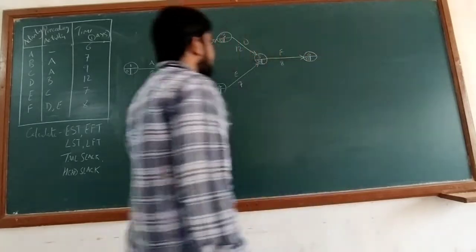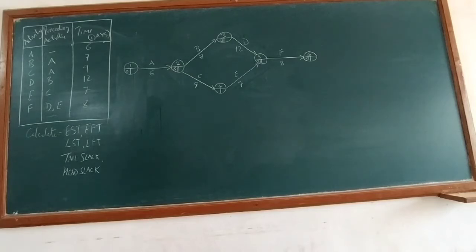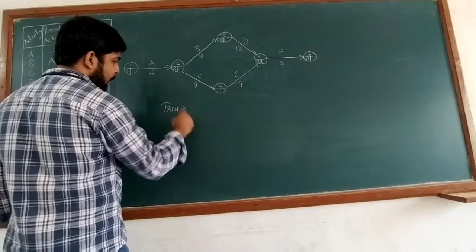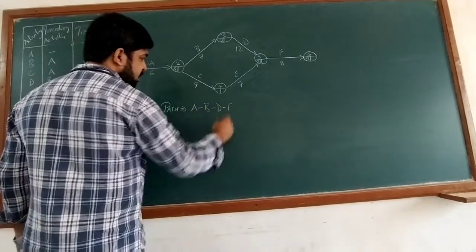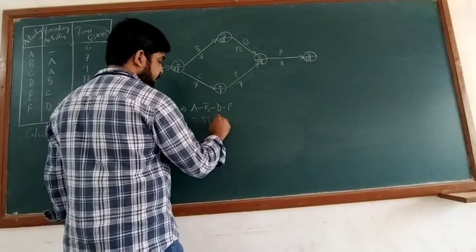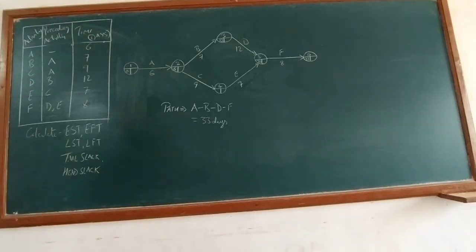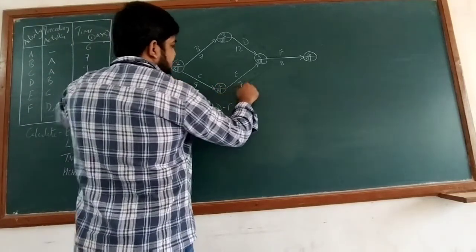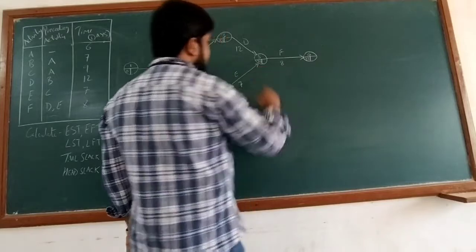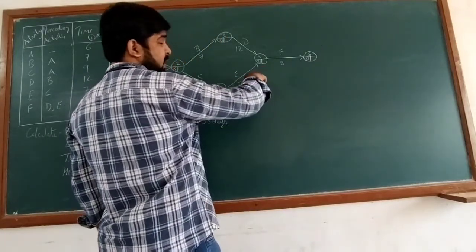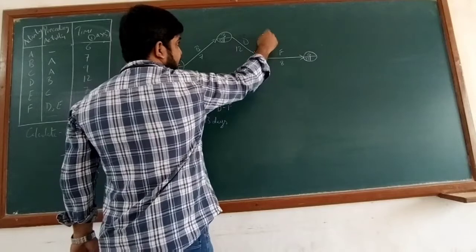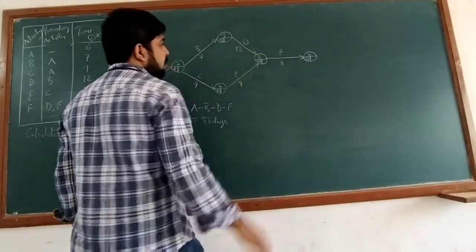So along path A-B-D-F we require 33 days. For the next path: 0 plus 6 gives 6, and 6 plus 9 gives 15 at node 4. Then 15 plus 7 gives 22. However, at node 5 we have both 25 (from path A-B-D) and 22 (from path A-C-E), so we take the larger value, which is 25. Then 25 plus 8 again gives 33.